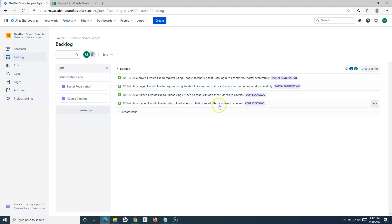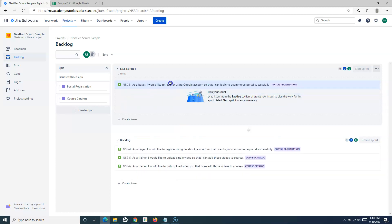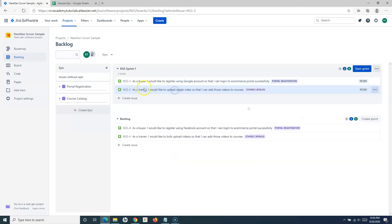In the next-gen project backlog, the project is there and there are some items in the backlog. The first thing is to create the sprint — Sprint 1 has been created. Now I plan this sprint by dragging the issues from the backlog that the team wants to work on within the two-week or four-week iteration. Say in this project, the team has decided to complete two stories within this sprint — the stories should be well defined and groomed so the team can start working on them.